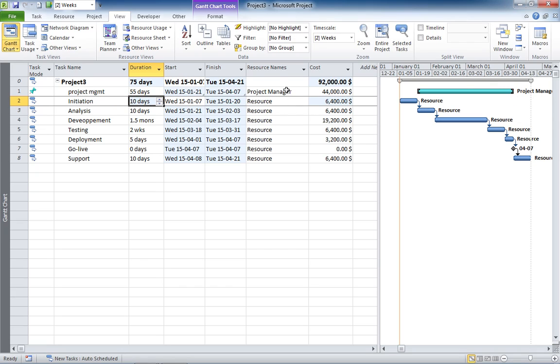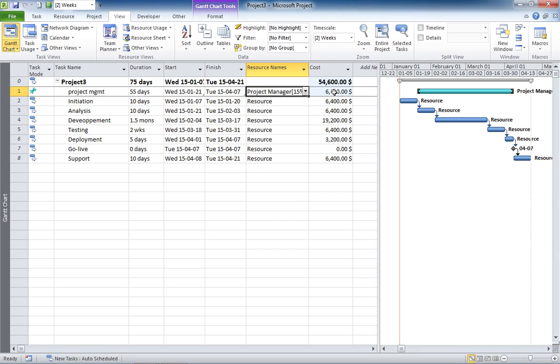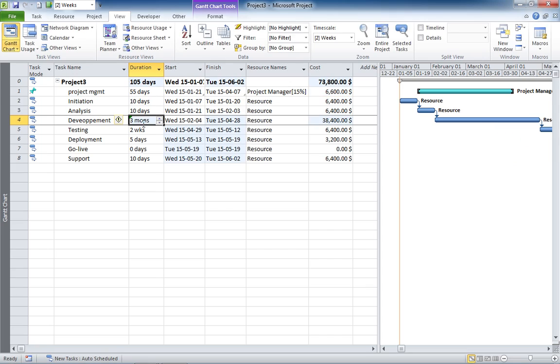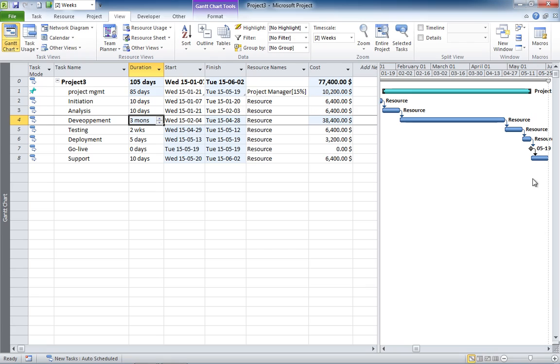And you can even assign a portion of a project manager. So let's say the guy is working 15% of his time on this project. That will still work, the cost here will be adjusted accordingly, and the task will still follow. If I add, for example, 3 months on this task, the cost is updated and the task still follows the go-live milestone here.